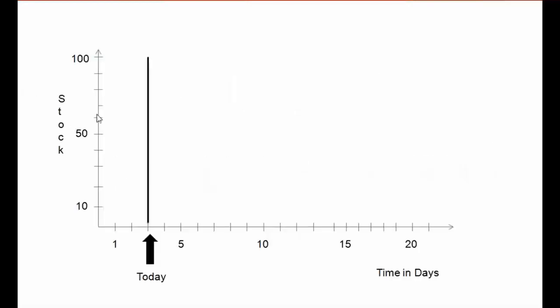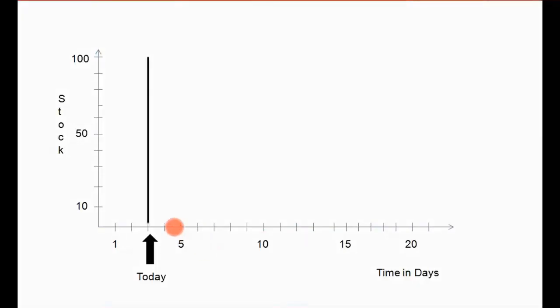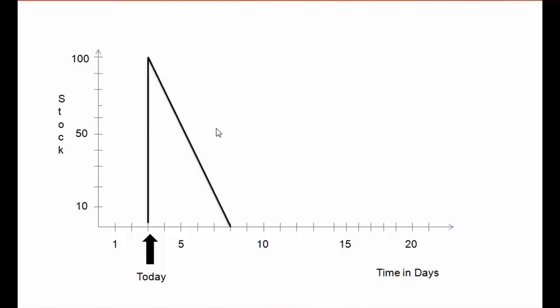So suppose here you can see in the graph, you can see stock. So today we have, say, 100 pieces of stock and the consumption per day is 20 pieces. On the other side here you can see the time in days. So today we have 100 pieces of stock. Now if I am using 20 pieces of cement bag every day, then how many days it will take for me to consume the stock? If you see that graph, if I use 20 bags every day, in next five days I will consume all the 100 pieces of stock. And suppose then I will fulfill the stock again with 100 pieces, and again in the next five days I will consume all the stock.